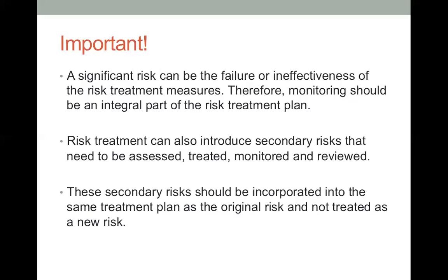The secondary risks should be incorporated into the same treatment plan as the original risks, and not treated as a new risk. So although it has developed into something else, we need to treat it and incorporate it in the original one.